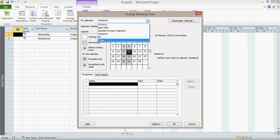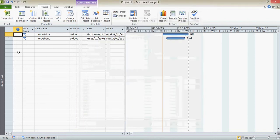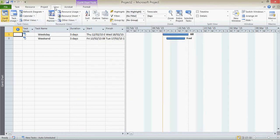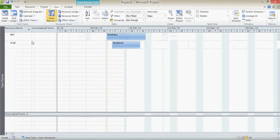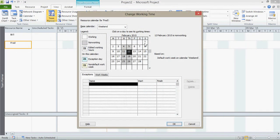What I can do though is I can use Fred's calendar from here. Yep, now I'm just changing it for Fred. Much easier simply to double click on it, double click on the resource and go change working time. Then I know I've got the correct calendar up for the resource that I want to change.